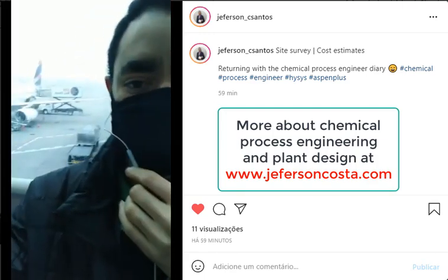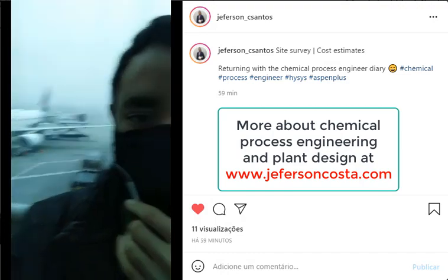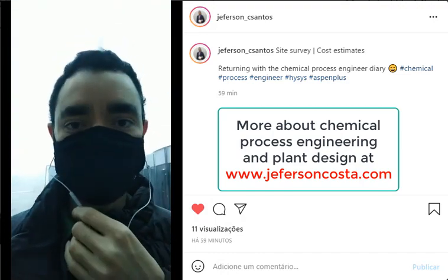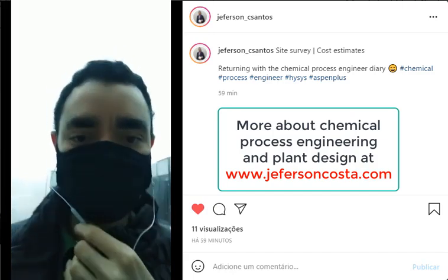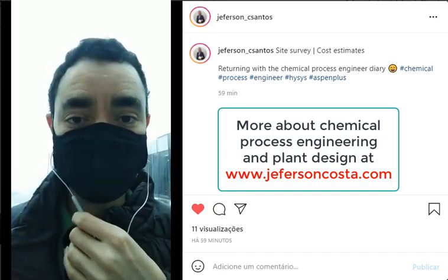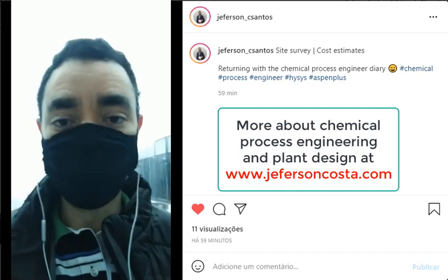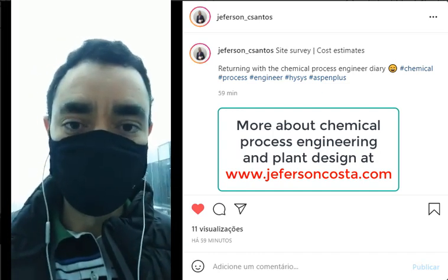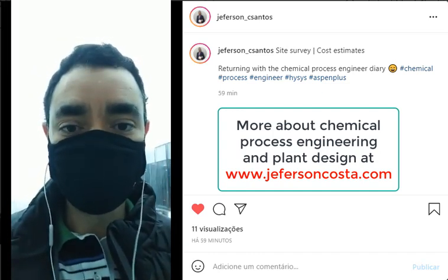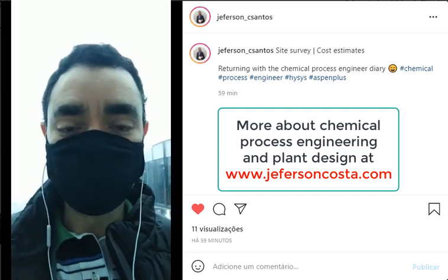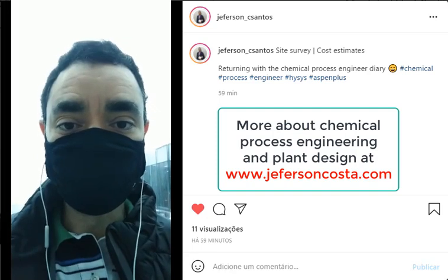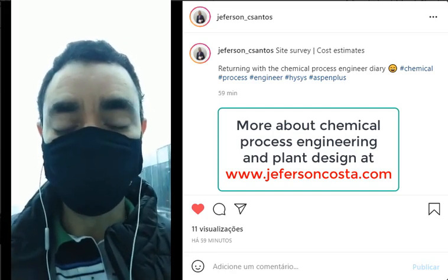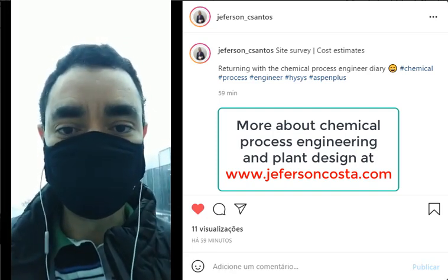As you can see, I am at the airport because I'm preparing myself to do a site survey. Site survey is an activity that we do in plant design to evaluate the information that we will find in the field. So if I need to install a project, and especially in a greenfield or in a brownfield, it's important to go to the field and verify what information is available there.